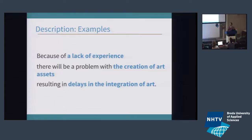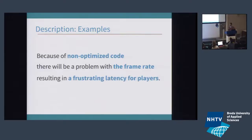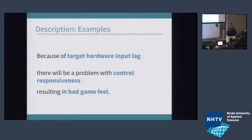Another example: because of non-optimized code, problems with frame rate resulting in frustrating latency — this might be a performance problem. For instance, if you would have input lag in your game, it would severely lead to bad game feel. This might be a risk in your project. Through prototypes and research, you might need to see if you can overcome that. But if you can't, what other solutions do you have to still make the game work with that input lag?